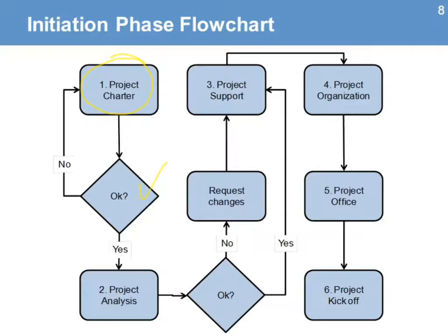The next step is that the project manager will review all the documentation from the project. That is the project analysis, especially the information used for the design of the project, and become familiar with the project contract and all its clauses. If something is missing or is not clear or complete, the project manager should request changes before starting any work on the project. Next is project support.